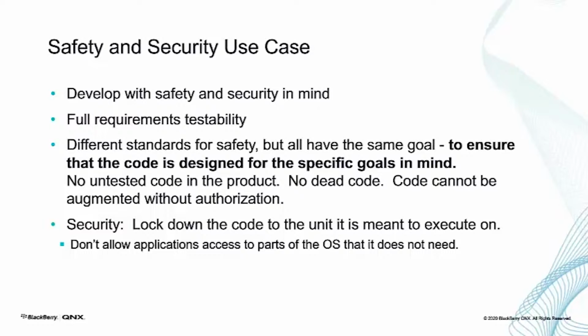A lot of people try and throw these things in at the end, and then, of course, when the schedules are late, then you actually see where, well, do we need to test it all? Can we get away with this testing? How about if we shortchange this one? Oh, we changed this feature. Do we really need to retest everything? And the answer is if you do it from the beginning, then your system is always tested to the level that you've tested it at, and each component is tested along the way. So ensure that you do that.